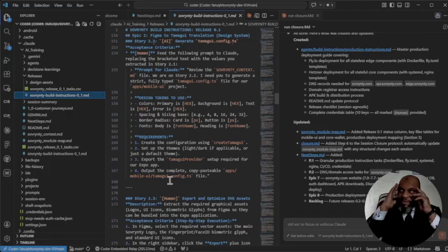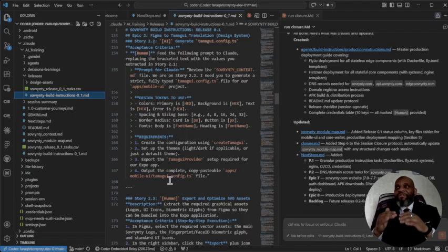So I'm using my project manager hat. I incrementally structure how I want this thing done. And then I tell it, in that increment, break it down into epics and milestones. And then from those milestones, break it down into tasks. And in those tasks, break it down to granular steps in each task to get that thing done. And then do something key.